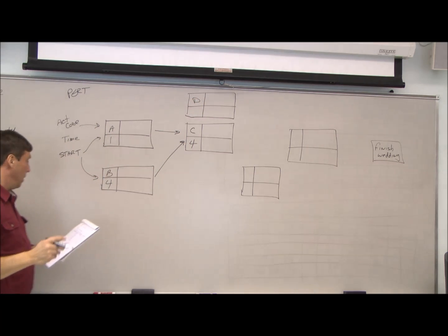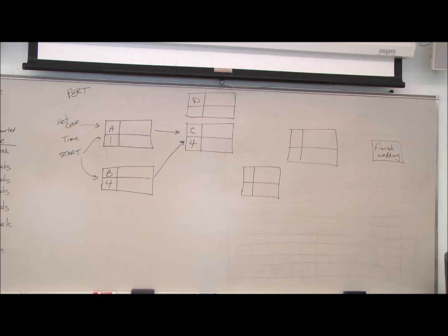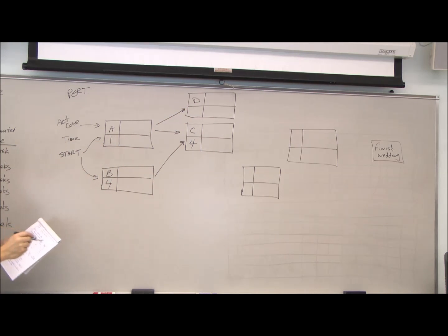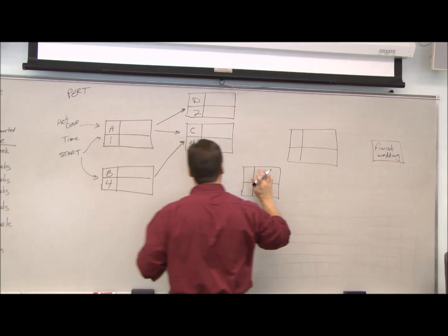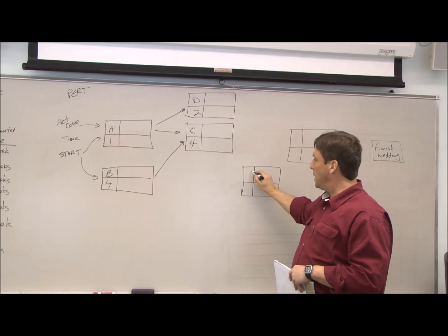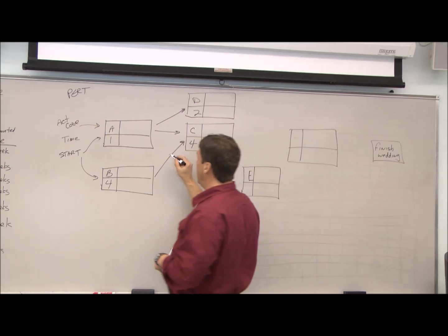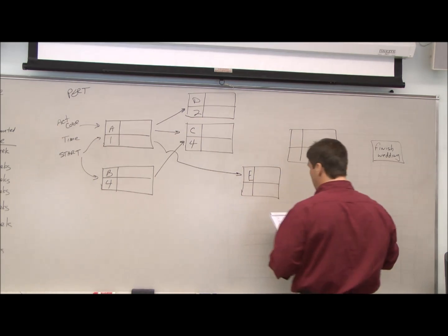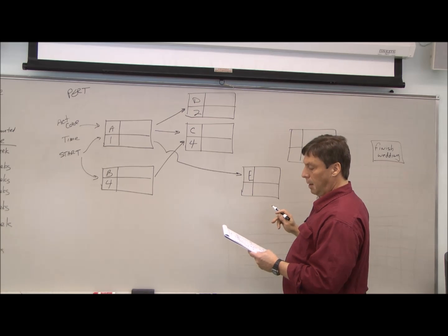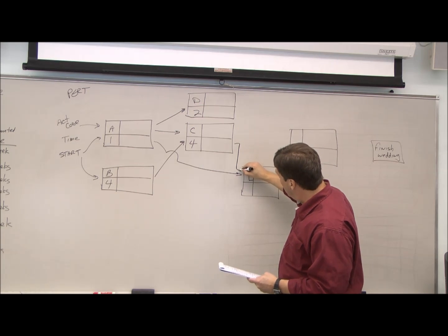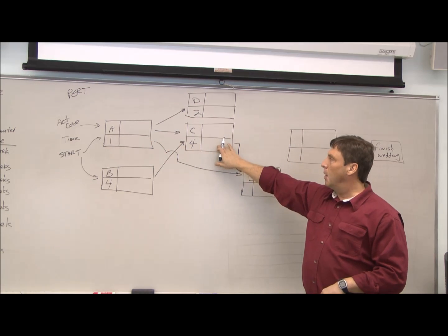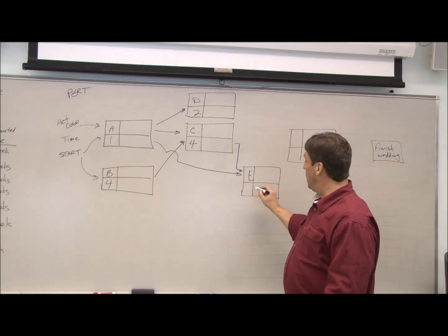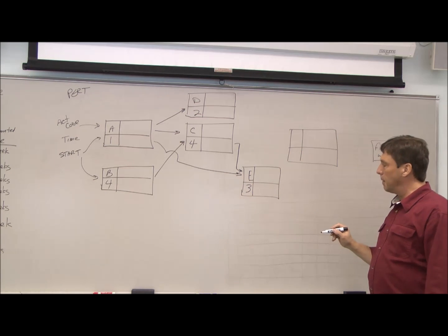Activity D, which was selecting our DJ, is just dependent on A. And D has a lead time of 2 weeks. Next, we're going to look at our catering, which was E. E was dependent upon A. That's my symbol for jumping the line there. Dependent upon A, and the caterer was also dependent upon C. Again, we need our tux to look good. We need to know what place we've selected, so we have to know how many guests we can invite. And it's going to take us 3 weeks to put together the guest list.